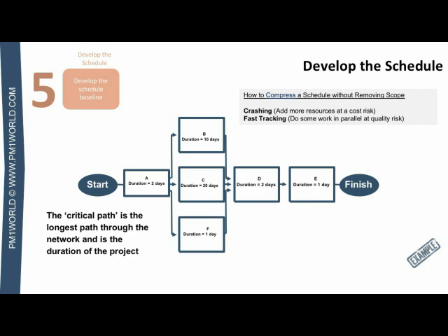So even if B and F finish early or finish on their earliest finish dates, they're going to have to sit and wait anyway because D still has to wait until C also finishes, and C is 20 days. So activity C, on the other hand, has zero float. Any delay to A, C, D, or E would be an instant delay to the project schedule.